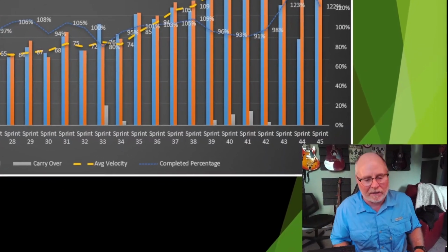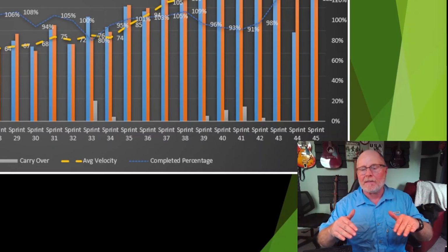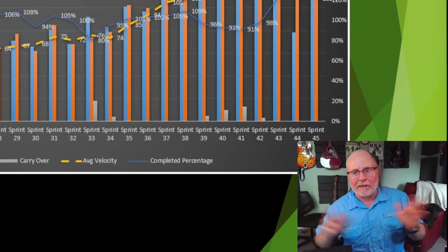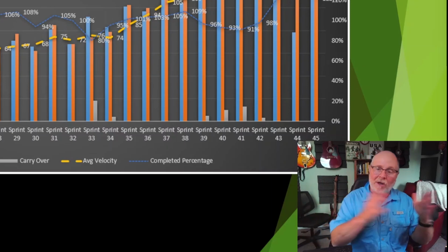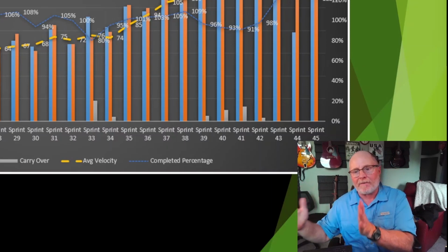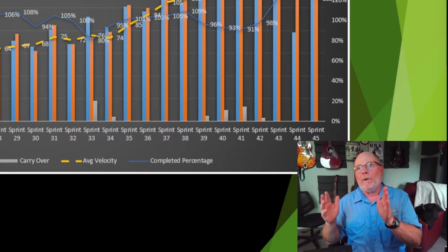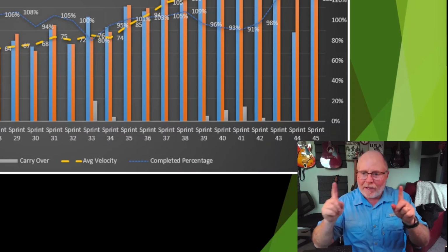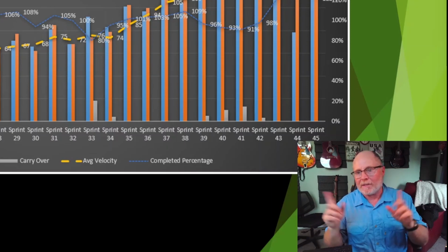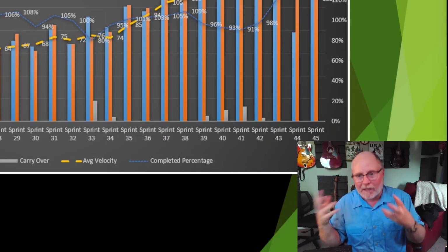Yes, we created a component team, and it's because there was a whole bunch of teams that were touching the APIs. Because they were all touching it in a disorganized manner, they were actually causing each other trouble. So by moving the governance of the APIs out to a team that specialized in the APIs, we were able to eliminate one of the problems, which was that everybody was in the code base modifying things, and it was kind of helter-skelter.